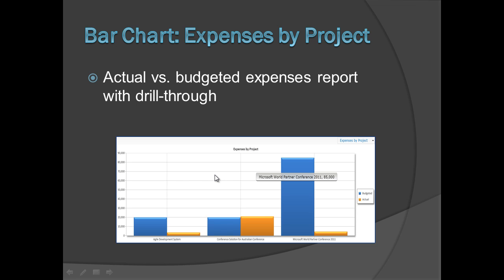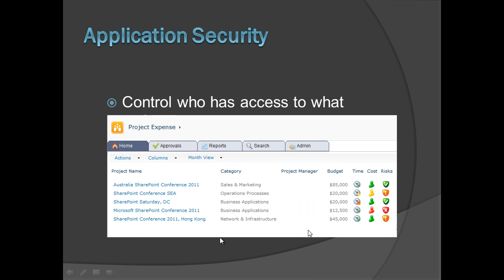And for the reporting bits, what we're going to be doing is joining values from two tables, the actual expenses and the budget, the project budgeted value, and also providing a drill tool into the project workspace. Now, that is in terms of the functionality. But at the same time, when you look at the security control, the project managers can access much more functionality, whereas the project team members have less functionality to access, right?